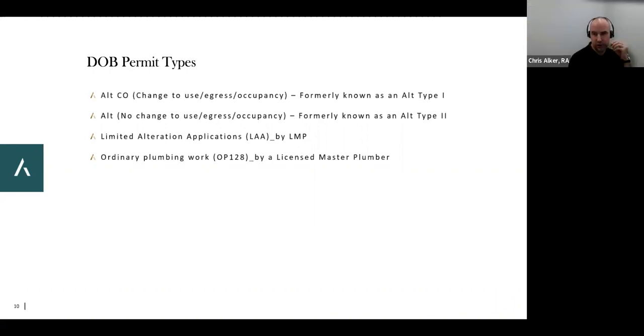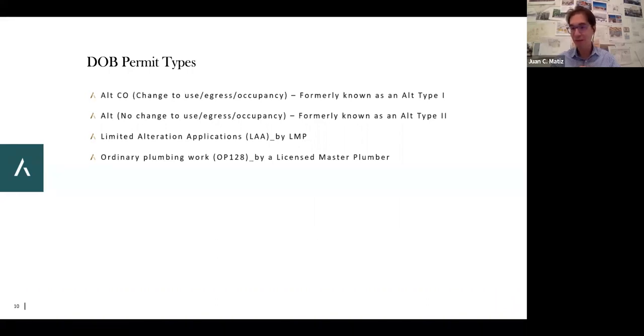Do I need a permit for a pressurized wall? Yeah. You're not allowed to put a partition up to subdivide spaces without getting a permit, regardless of whether it's temporary. That's correct. Because temporary is how long, Chris? Is that for 2-3 days or are you going to leave it up for 5 years?